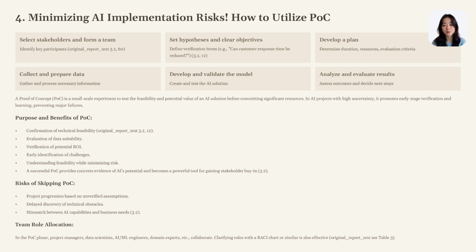On the other hand, what happens if you skip POC? There is a high risk that the project will proceed based on an unverified hypothesis, that you will hit a technical wall later, or that the completed AI will not match the actual business needs. In order to effectively proceed with POC, it is necessary for diverse members such as project managers, data scientists, AI engineers, and on-site domain experts to work together.